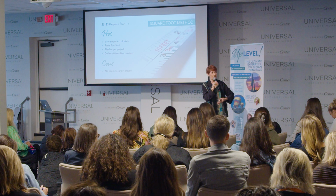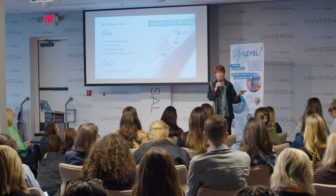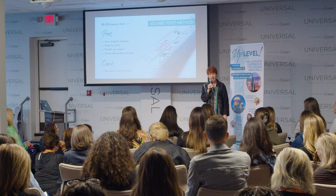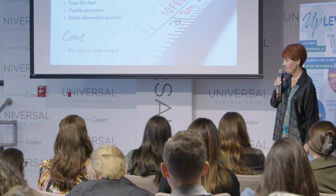And one of my designers had a 9,400 square foot home, and she said, Melissa, all I'm doing is finishes, fixtures, and lighting. I said, that's a big deal. Don't put "all I'm doing" in front of it. That's a big deal. And I said, you've got a choice between $7 and $10. She went after $10 and she got it. $94,000 for finishes, fixtures, and lighting. Anybody else kind of want that? Yeah. Kind of cool, huh?